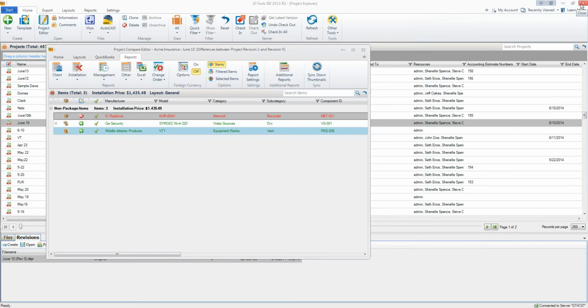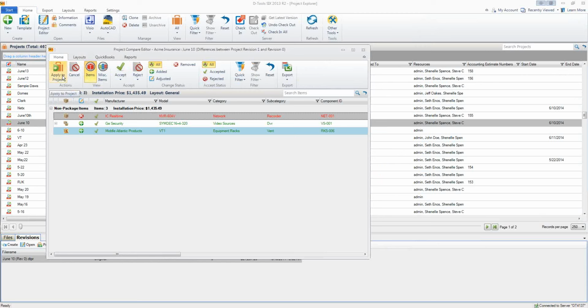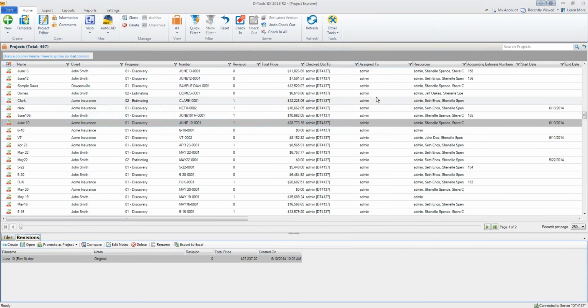You can accept those as well, and you can also pick and choose what you want to show on the change order. So if there are five items on the change and one of those you're eating, and you don't want to show that to them, maybe it was your mistake for whatever reason, you can pick and choose what you show on there. So that's kind of how we do revisions. There's a whole process in place for managing that as well.